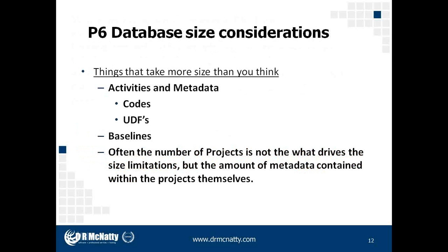Now, one thing that we learned from working with some of our IT folks who look at a lot of database environments is that the things that create a lot of size in a database are not always the number of projects. We saw this recently with an individual that had maybe only a handful, a dozen projects, but they were getting an error like this. The dozen projects didn't have a ton of activities. They weren't huge schedules, but what they had were a lot of activity codes, a lot of UDFs, and a lot of baselines. So the underlying metadata is something that would need to be cleaned up.